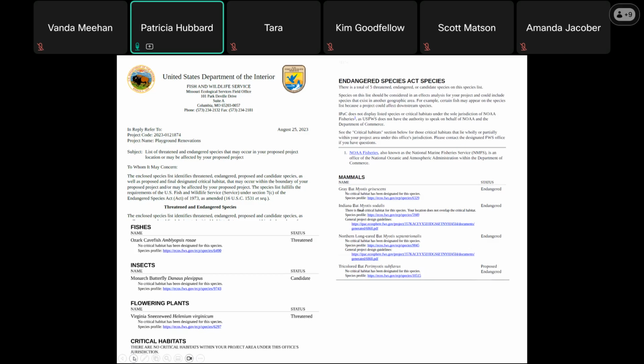Along with this letter to U.S. Fish and Wildlife, you should include a copy of your LWCF boundary map, a map that shows the APE and the staging area for the project and marks any trees that will be removed, and the location map that is zoomed out to give the address of the park, latitude, longitude, township, range, and section. The location map should also show if there are any caves within a 1 to 2 mile radius.